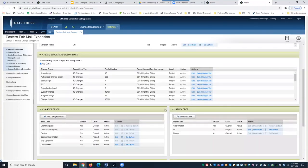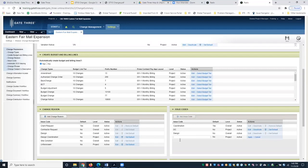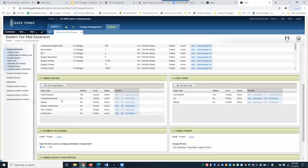Down here we have change reason and issue codes. When you create a change document in Gate 3, you'll have a dropdown to select a change reason and issue code based on what's been configured here. You can add multiple entries and click Apply. This is also useful for reporting and filtering reports — you can set up as many change reasons and issue codes as you want.